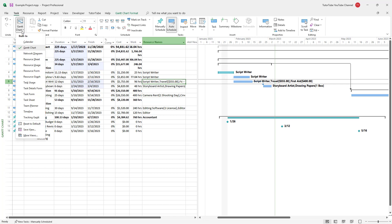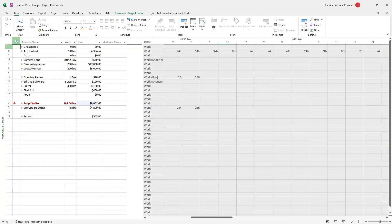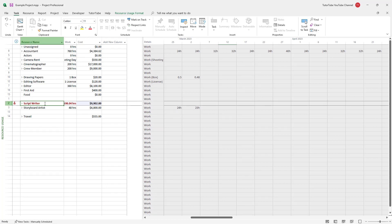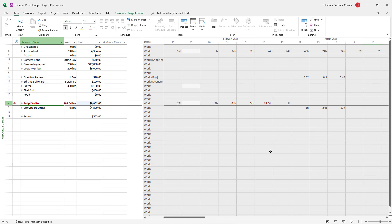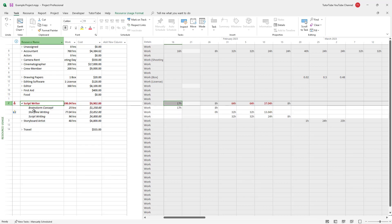If I go to Resource Uses now, you can see that it says script writer in red, meaning the script writer is over-allocated because there are more tasks. Scrolling over, you can see the over-allocated section, which makes it easy to identify what is being over-allocated for the script writer.